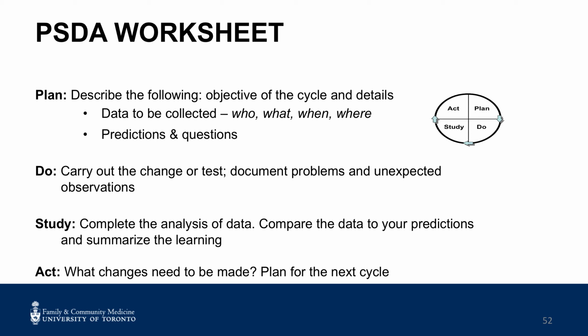The first step in the PDSA rapid cycle for improvement is plan. This is when you state the purpose of the test. You predict what you think will happen, and select a measure as feedback in terms of the effectiveness of the test. The measure may be quantitative or qualitative, and as simple as a number. For example, output of something, or a yes-no answer. For example, was a form easy to use? Prediction is a critical element of the plan phase, as it drives the learning about our systems. We predict as we would hypothesize. We measure to determine if we are correct in our prediction.